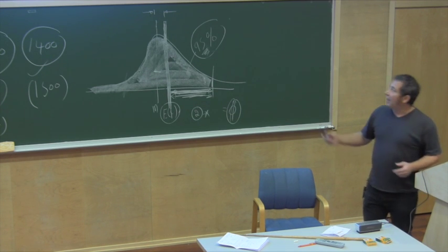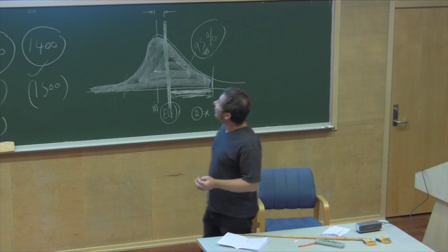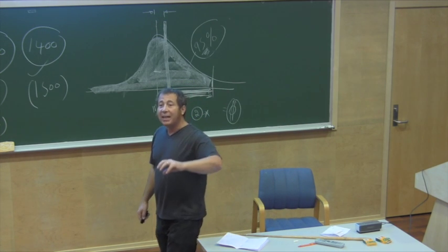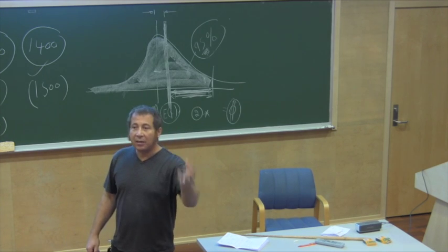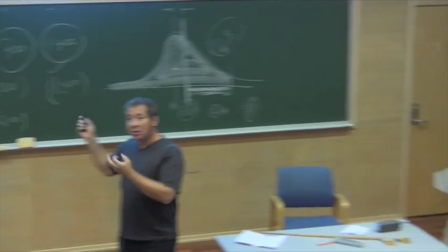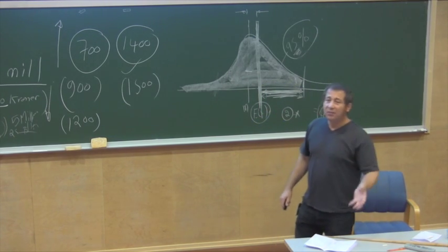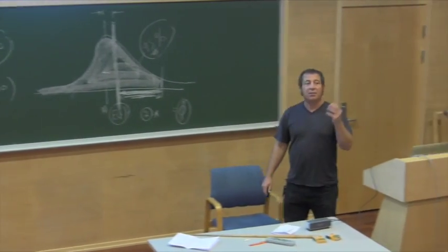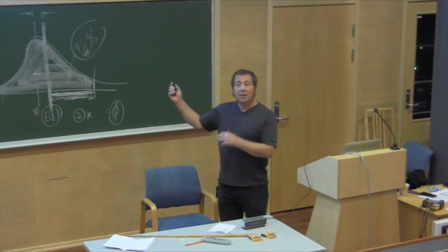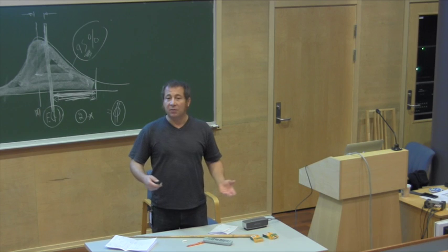And the bottom line of this project is net savings of 10%. They managed to save 10% of the original cost estimate. The original cost estimate of this project was $350 million, and they managed to save $35 million. One of the things they used was incentives.